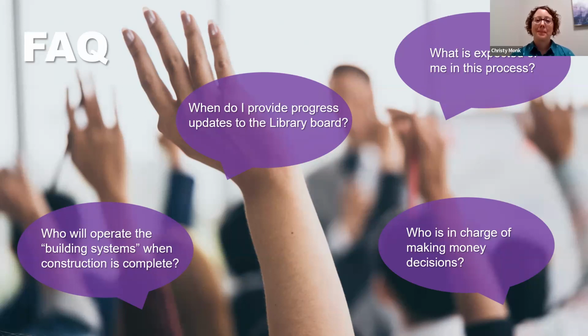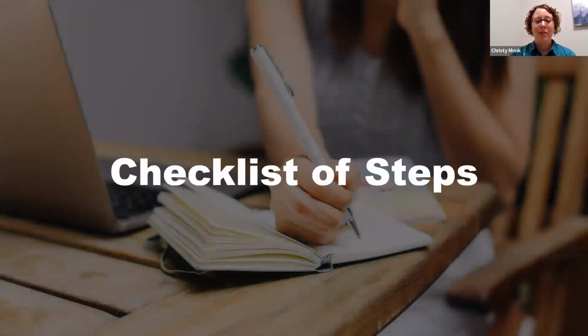Yep. So I think that's a healthy way to do this. When we said earlier about having a healthy construction budget, it's not just the money for construction, but it's also that money for a contingency to take care of things that do come up. Yes, you need to expect the unexpected, and one of the ways you do that is through the contingency. Yep, good point. And look for a checklist of steps to be available on a recap of this process and the parties involved.